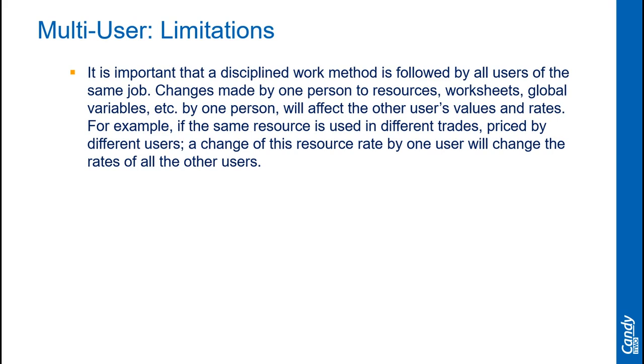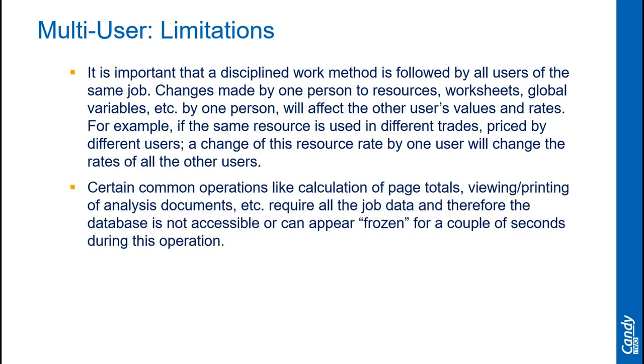If I go and change the rate of cement while pricing the concrete items on page number 1, and that same resource code cement is used in the masonry section, those rates would change, of course. So any changes made to the resources or the global variables or the worksheet would update the entire job. So be aware of that.